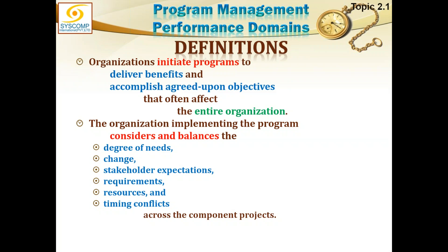You have to prioritize and balance your components within the program. Look at which component has the greatest degree of need, where change is most prominent, what the stakeholder expectations and resource requirements are. The most resource-hungry component may not get priority. We also consider timing conflicts — similar to a critical path in project management, there is a critical path concept in program management too. All these aspects must be considered in orchestrating program components.